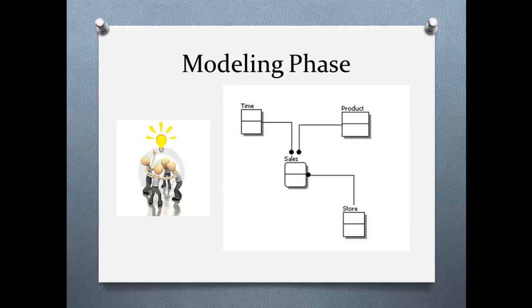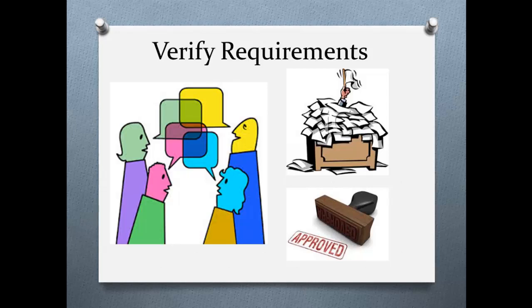One other thing I want to say here is, once the final BRD is done, before the sign off of the business, they are going to check things like estimated deliverables and delivery date, estimated budget, requirements, and all that stuff, just to make sure that both the client, or the business, and the implementation partner, the vendor, are on the same page.